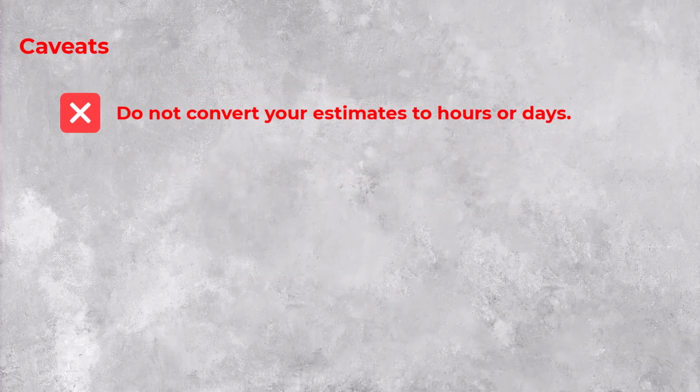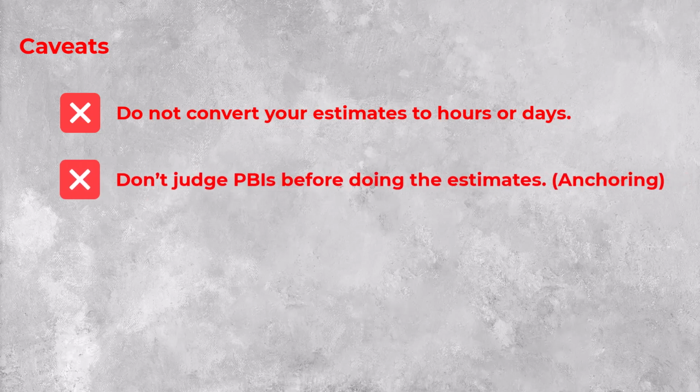As the last part of the planning poker section, keep these caveats in mind. Do not convert your estimates to hours or days. It is just a relative estimation for complex work where you still don't know everything. And don't judge PBIs before doing the estimates. It affects the minds of other team members and makes them biased.